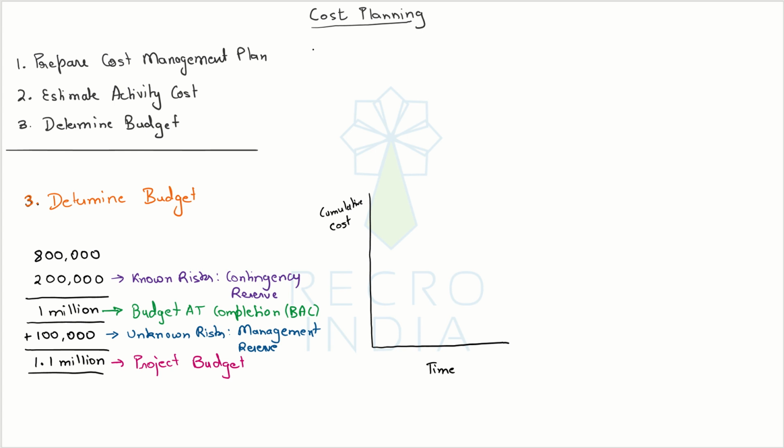And then similarly you can do it for day 2, day 3, day 4. And when you plot, this chart should come out in this shape. So that's why it's called an S curve. And the reason is because in the starting you are not really going to spend a lot of money, because the starting of the project is more about organizing, planning, building your team.